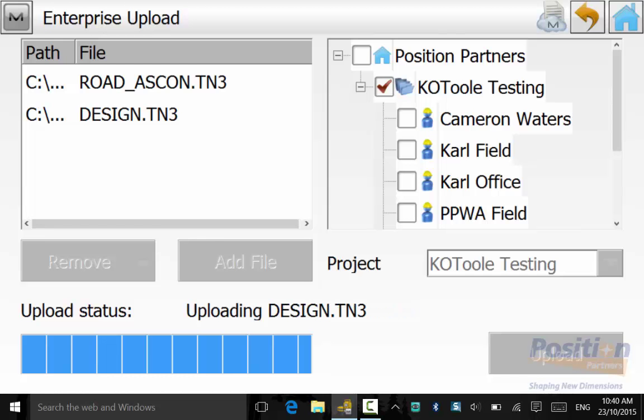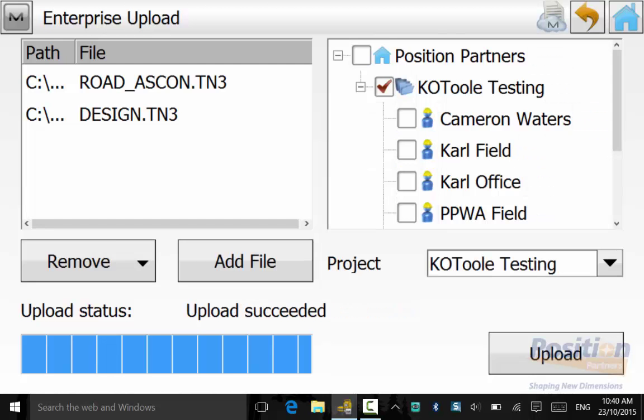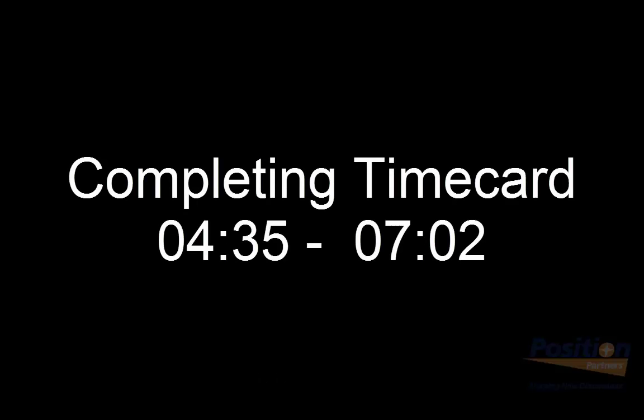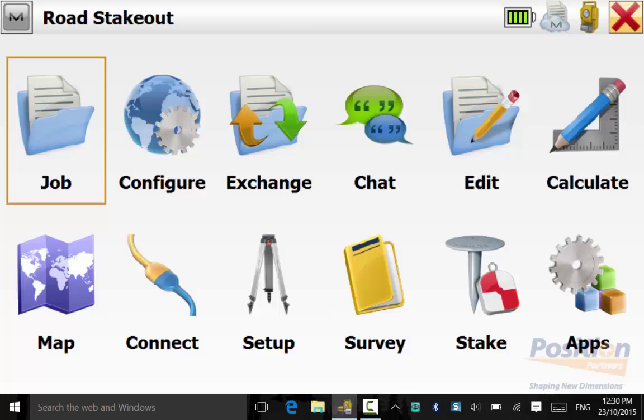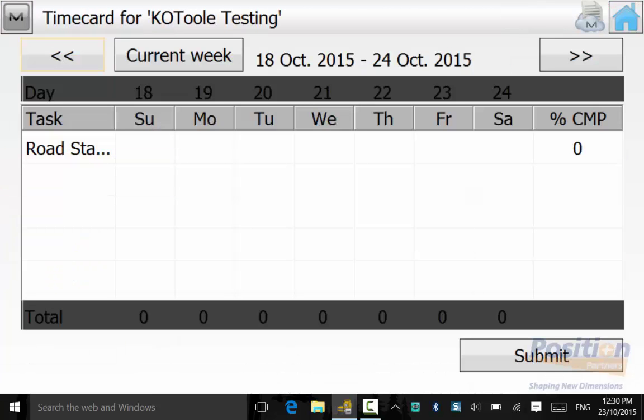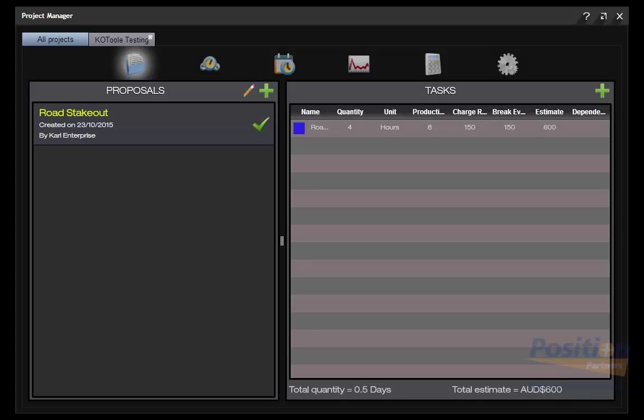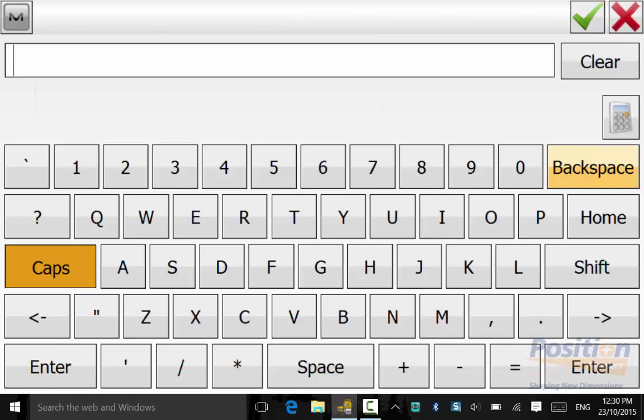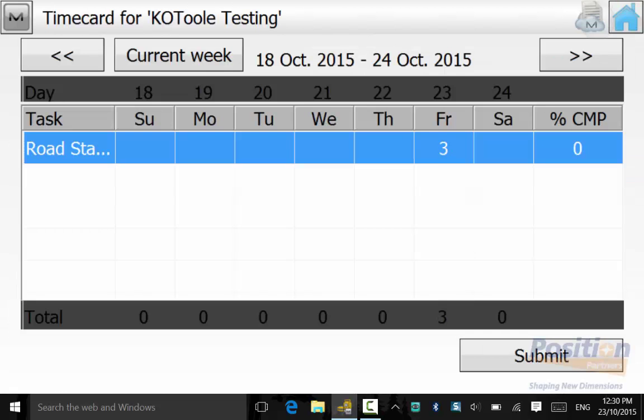We will go back out to the main menu and go into the Magnet Symbol and then Time Card. We will now fill in our timecard for the work that has been completed. There is a Task Road Stakeout. We enter in the date that the job was conducted and the hours that it took to conduct the task. In this case, it took 3 hours.